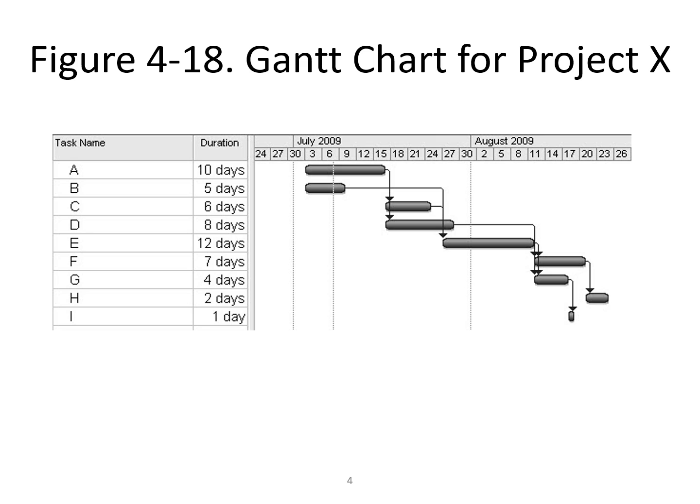One of the ways to look at work over time is with a Gantt chart. This one was produced with Microsoft Project. One of the main uses for this type of project management software is that you can enter data just one time and use it many different ways. As you can see, there are 9 tasks listed A through I, with each task having a duration in days. All you need to do is list the starting point for each task, and the chart that is produced shows you graphically all of the work over time for the project.